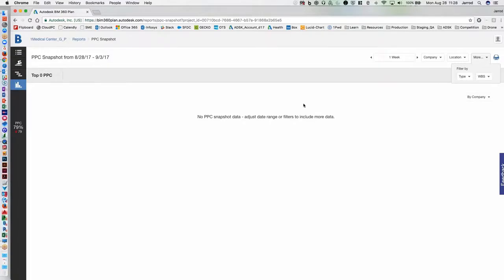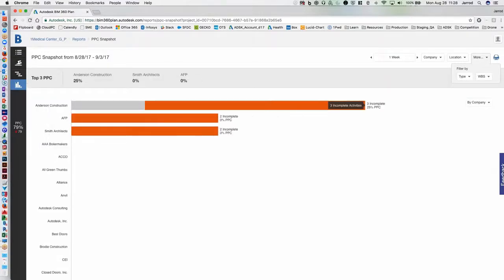Show all work breakdowns. Let me just run this. There we go. So now we have not only, for the project, we actually have it for the actual contractor. So you can see here, Anderson Construction. We can see that they have 3 incomplete activities, 25% PPC.